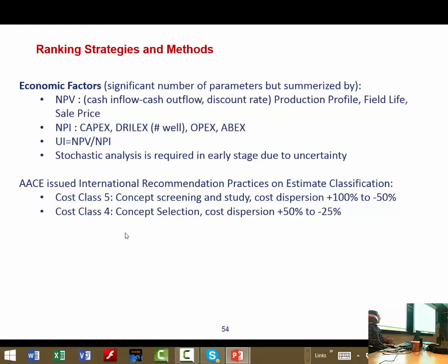For the hull, the weight is an important parameter, also for process, for example. But for process, mainly the capacity, for example, the capacity of the separator; the price is estimated as a function of capacity. Because now, for example, there is a software called Oil and Gas Manager, which is developed by Siemens.